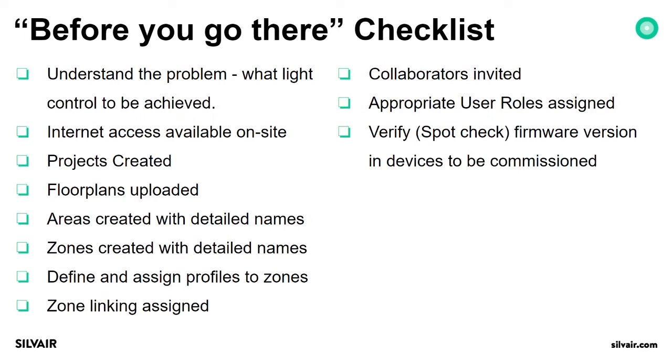For example, going forward with zones, you can easily distinguish storage rooms from open space areas, kitchens, or any other types of rooms. You should also define and assign profiles to zones before going and starting with commissioning.